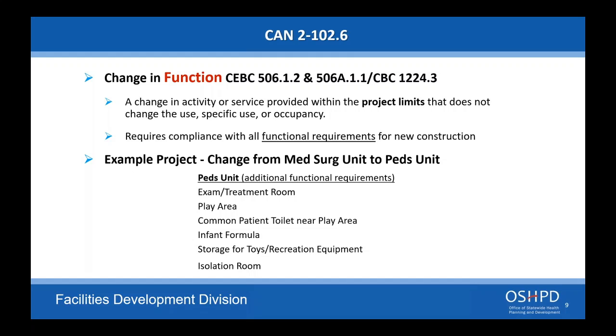Next question. In cases where temporary MEP equipment is needed for, say, a normal generator, chiller, or air handler alteration project and not an emergency replacement project, would the temporary work need to be submitted under a temporary work permit or submitted with a normal permit? Actually, it's your choice. You can do it either way.